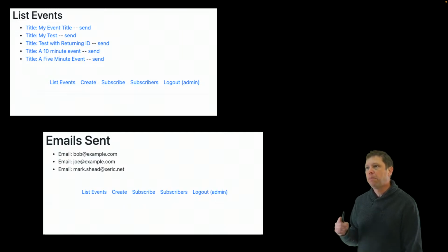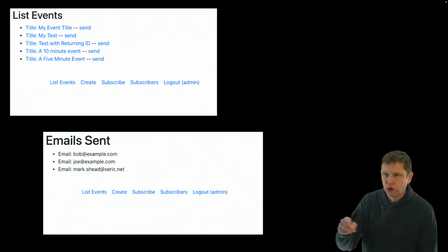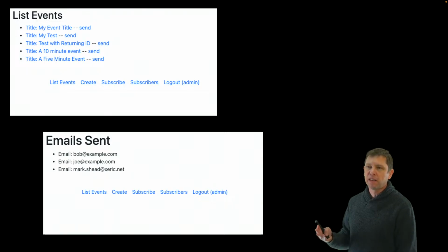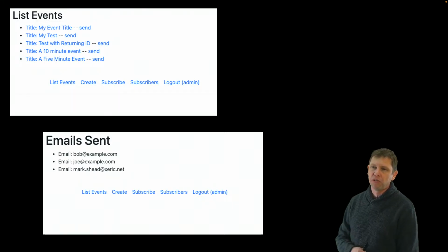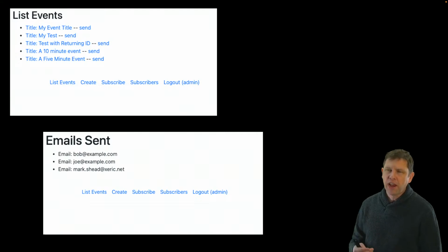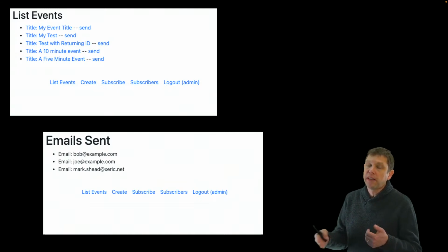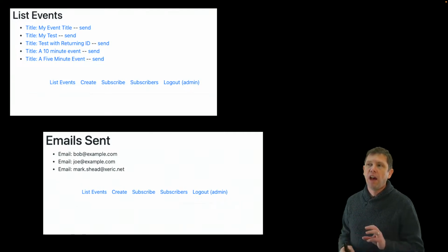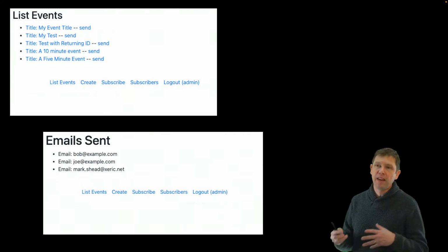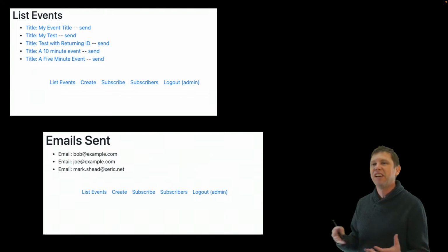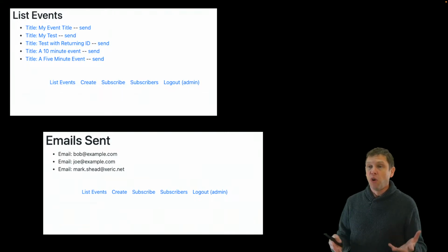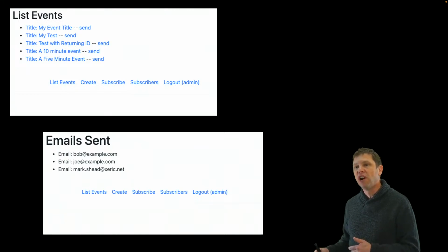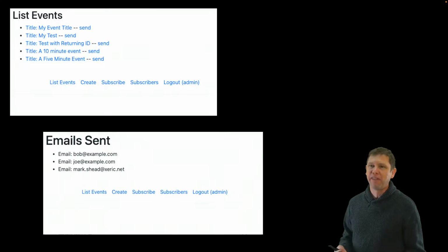The other thing that happens is people see that it's going to be so far off in the future before it does any good to them that they're not willing to show up, because it's like, yeah, 5 years from now, maybe we'll be able to start using this. And oftentimes, if you start showing small progress and saying, is this what you want? And try to get to the point that you can use part of it right away, it's easier to get people excited and involved about it and get that sense of urgency. People are like, oh, yes, we have something today, and you're working on something that in a few weeks might make my life easier. I'm going to show up for your meetings because I would like my life to be easier.